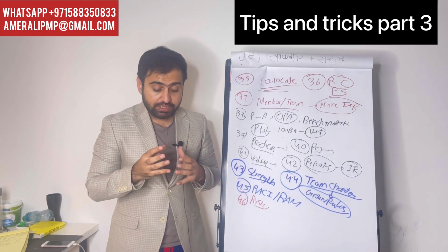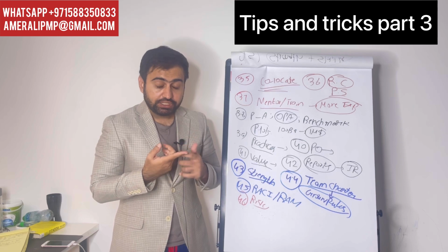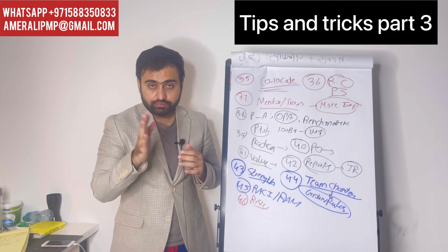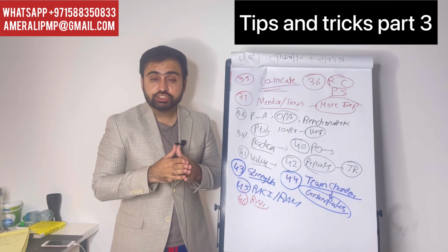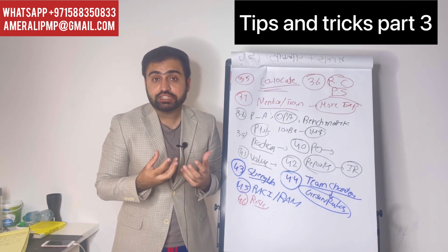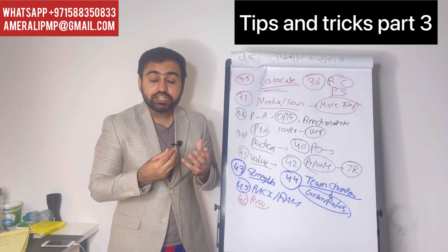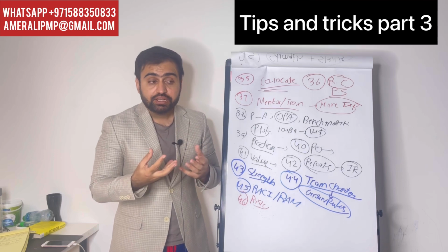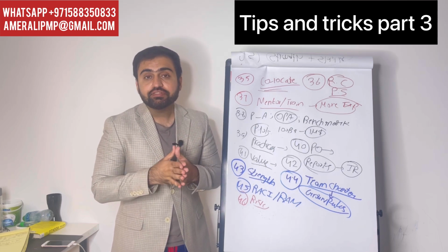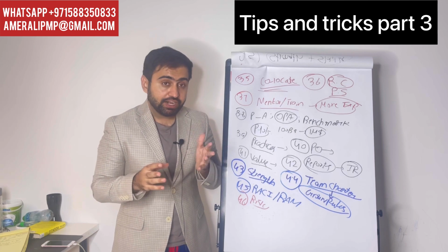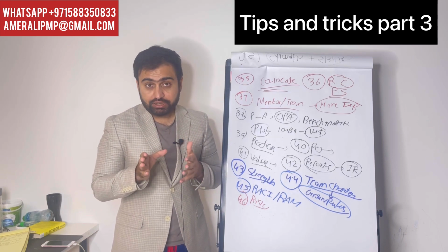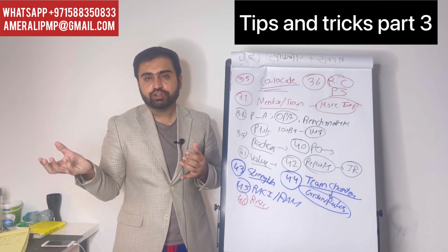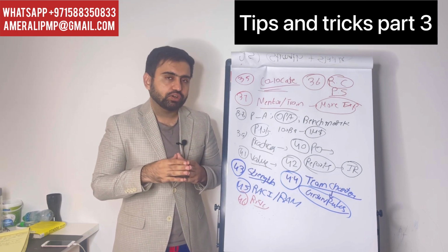One more time, all these strategies, avoid, mitigate, transfer for negative and exploit, enhance, share for positive, are proactive strategies. You take action even before the risk occurs, even before the trigger happens. The reactive one, I would say, is acceptance, both active and passive. In active acceptance, you identify the risk, you let it happen, the trigger happens, and you have a contingency plan for it. So this is an important thing to understand.